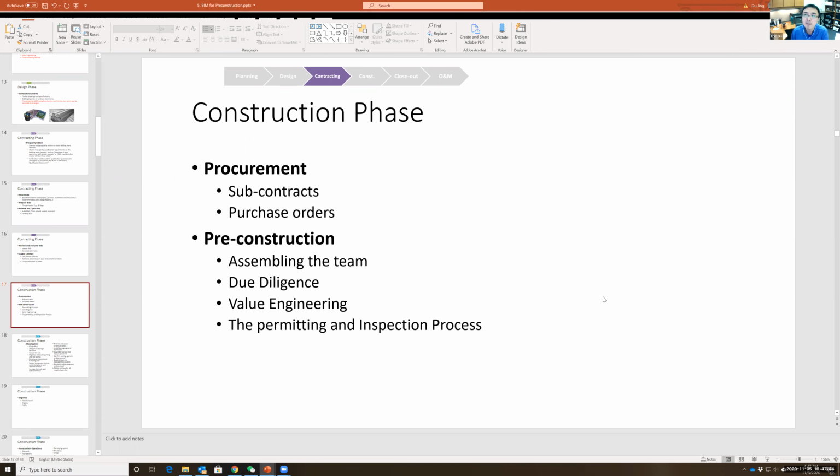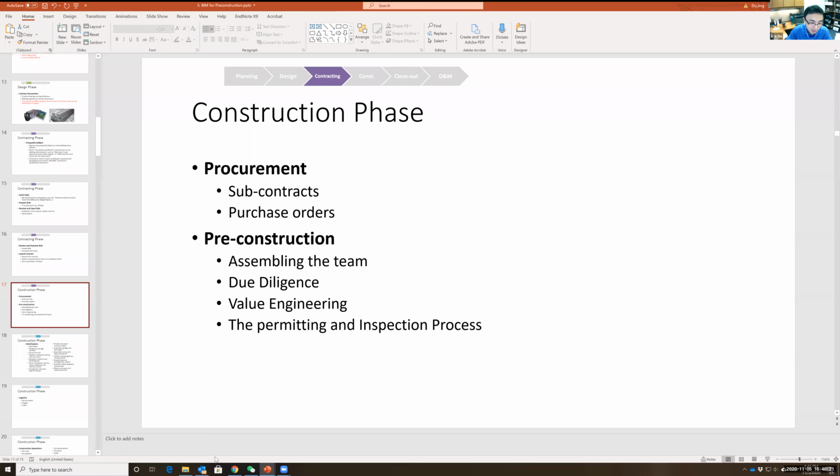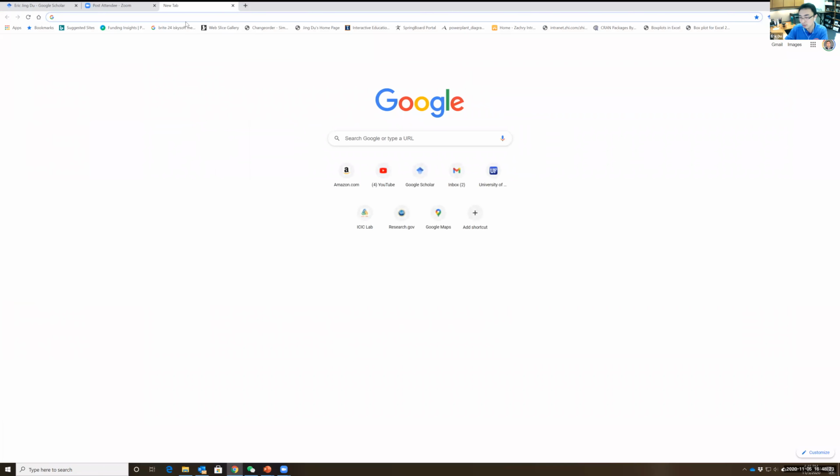I was working for Zachary, and Zachary was building this power plant in Freeport, Houston. A component is called an HRSG, heat recovery steam generator. Only South Korea can produce this thing. After they're ready, it takes the South Korean company 1 week to tie the HRSG onto the ship, and it takes the ship 1 month to move from South Korea to Houston, and it takes them another week to untie the HRSG. So let me see, maybe it's more visual if I show you how it looks.